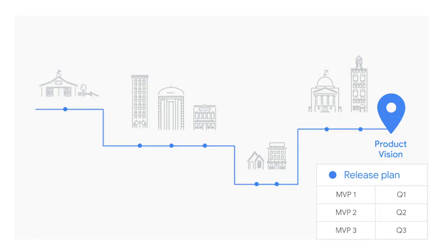The third component of a value roadmap is a series of release plans. The product owner and project manager work together to develop these plans. Product releases occur when the team has developed a basic working version of a given feature or requirement. A release plan includes the approximate date when the team is expected to release and deliver certain features to the customer or user. An Agile team may have several releases over the course of a project until their project is considered done. For this reason, only the first release date should be considered to be set in stone. The rest of the release plan is based on early estimates and is subject to change as the project proceeds.